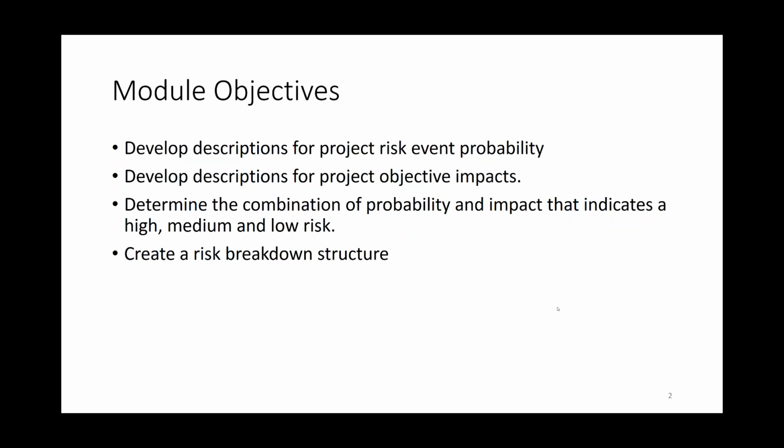So that's why we take the time up front to say, okay, what are people's roles and responsibilities for risk management? Who has what authority with regards to risk? What categories of risks are there? Where are the big sources of risk? Those are the things we want to think about up front. So when we're in the midst of a project and we're going through risk, it's almost like it's just something we do. It's, if you will, operationalized to go through the risk management. It's not a big deal.